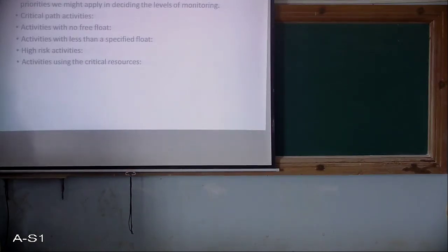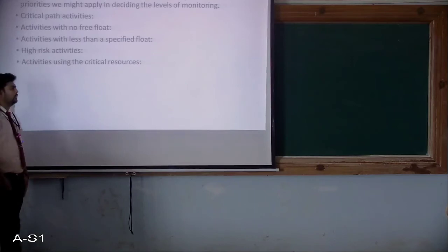Then it comes to activities with no free float. This also comes under the same kind of category, with a little bit of difference. A delay in an activity with no free float will delay at least some subsequent activities, even if the delay is less than the total float. Here we will discuss what we mean by total float.